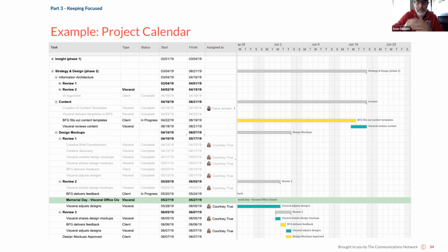And obviously, maybe a quick question before we jump forward, what's the value of taking more time? The value of taking more time is, and again, maybe a little horn tooting on my side, every agency works a little differently. How we do it now is we spend a lot of time up front in information gathering. We do a lot of our fact finding and iteration in the discovery phase of all of our projects before we even get to our information architecture or design. So the value is, we can still bake all that exploration and iteration into the design as well.